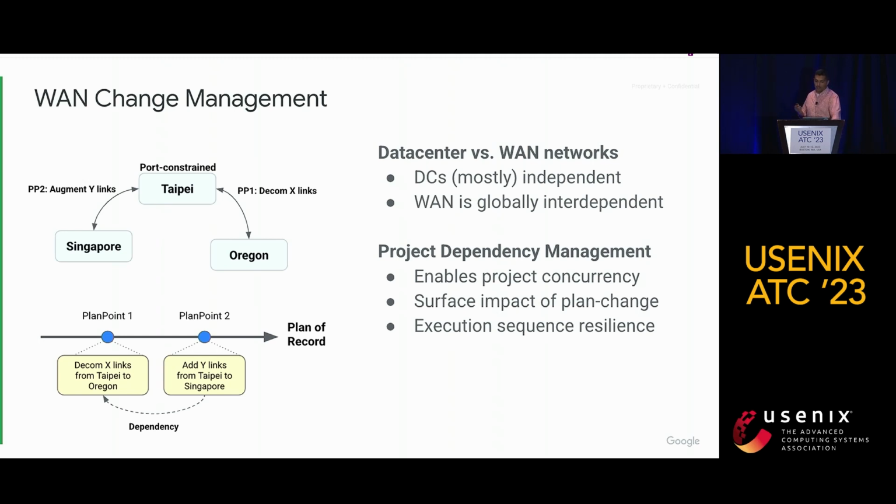The emergent structure of TopoPlan plans made it clear what projects depended on what, and what the impact of a change would be, in a way that was not clear to humans before. Due to unforeseeable real-world constraints like supply chain disruptions, construction delays, and so on, the actual execution sequence of these projects almost never matches the global order in which they are created at quarter boundaries.